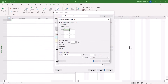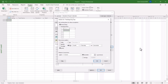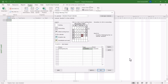In this dialog, select the yearly option and then select the definition for that particular holiday. In my case, Thanksgiving Day is always the fourth Thursday of November. At the bottom of the dialog, select the number of occurrences of the holiday that you would like. I recommend between 5 and 10 — I'll go ahead and set 5. Click the OK button when finished and there you have it.